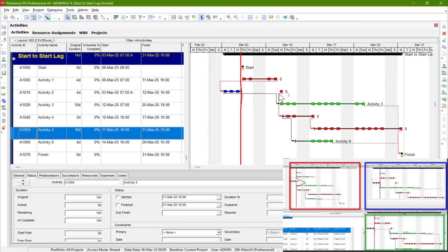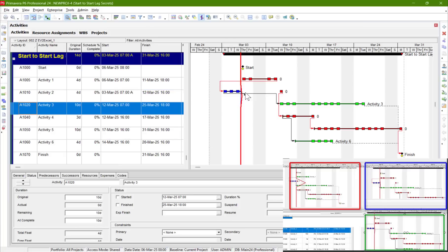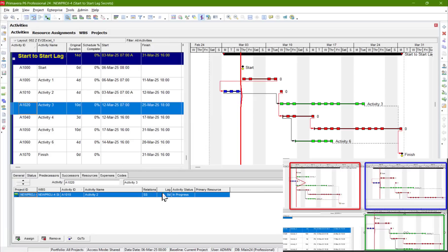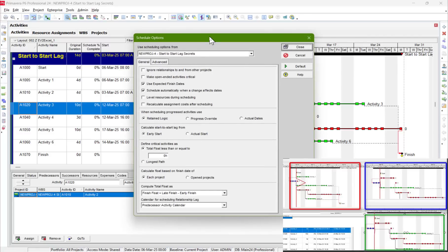Amazing — it split the activity! The start-to-start relationship between activity 2 and 3 is not being accepted. It has only a start-to-start relationship with zero lag, but now it's not accepting the zero lag.